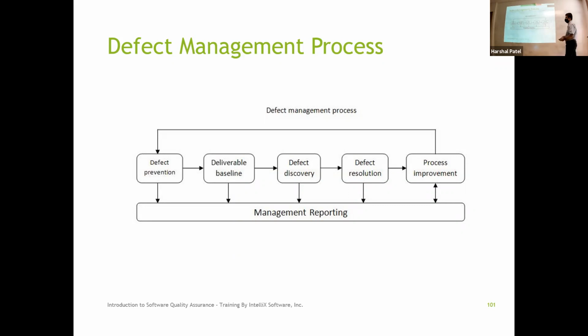So you may just start with, hey, we started doing a 3C and a T and we involved the quality assurance people. Guess what? We forgot the architect or technical leads to be involved also, so that they can identify what additional things they would have needed from the business users. We missed that. Because of that, it costs this much rework in this project, or it could cost us this many defects.